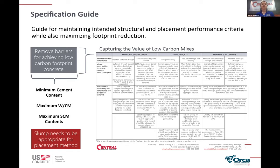Slump and placement requirements are really something that needs to be a conversation with the contractor rather than being specified from the structural engineer — because that's going to depend on whatever the placement methods are and the scheduling. From the specification, we just need to know what performance needs to be met so we can figure out the right combination of materials for the contractor's needs and put that together in the lowest embodied carbon way possible.